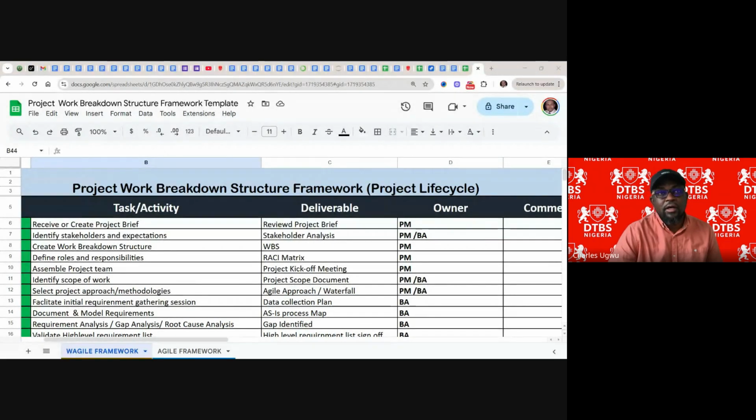If you have 3 months, first plan to deliver the project within 2 months. So if you are struggling to deliver within two months, you fall back on the 3rd month. So most of the things that are going to cause deficit is delay,